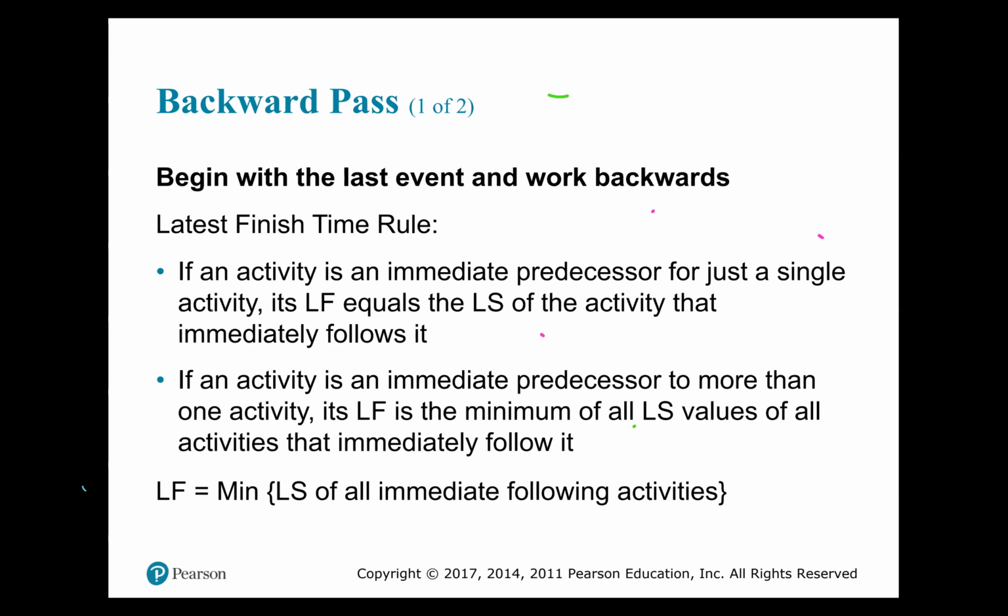If multiple arrows came into the finish node, you plunk it into all those slots that you walk backward on, going backward into the network.